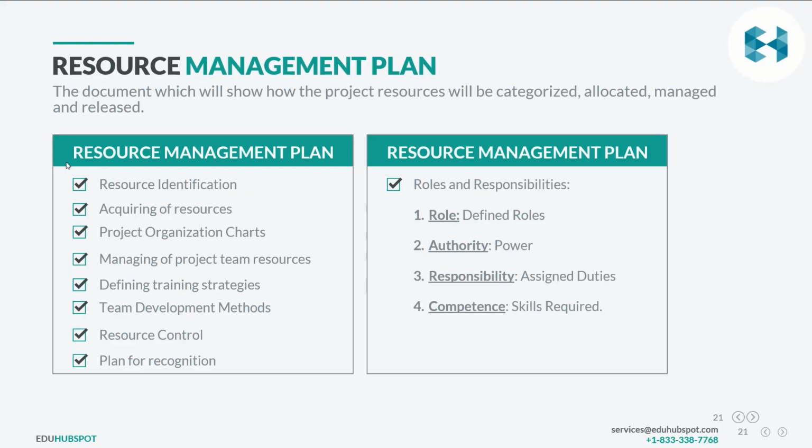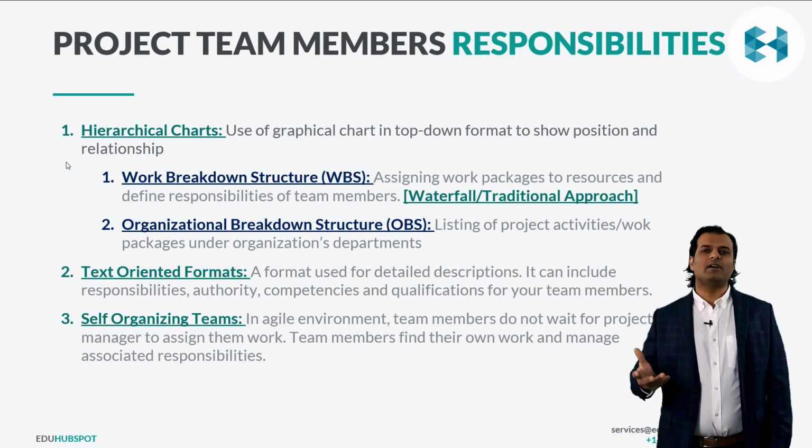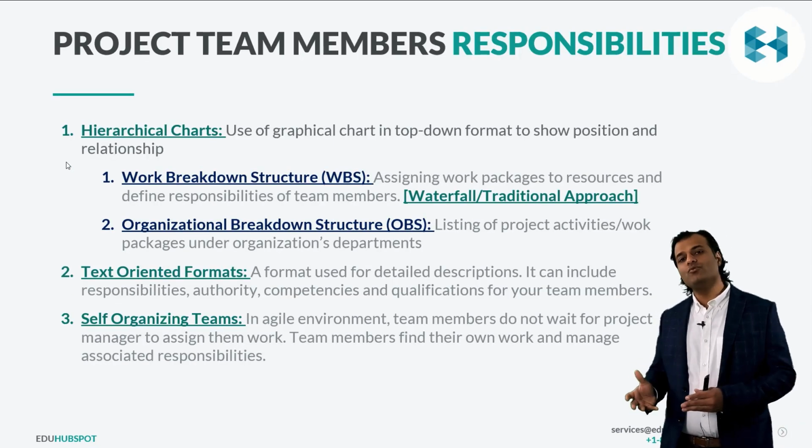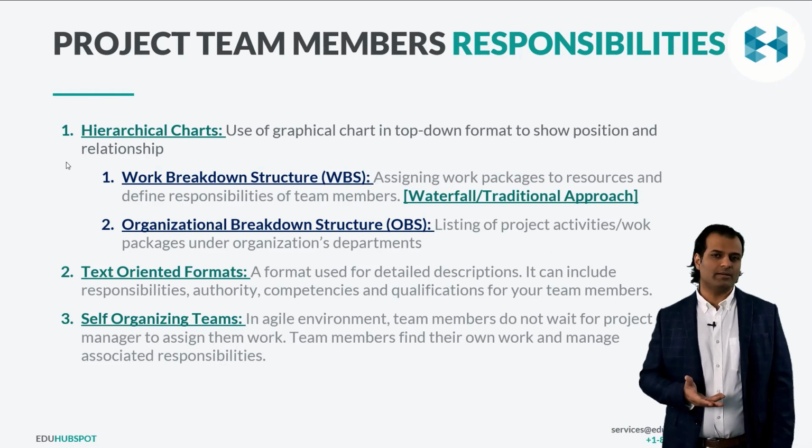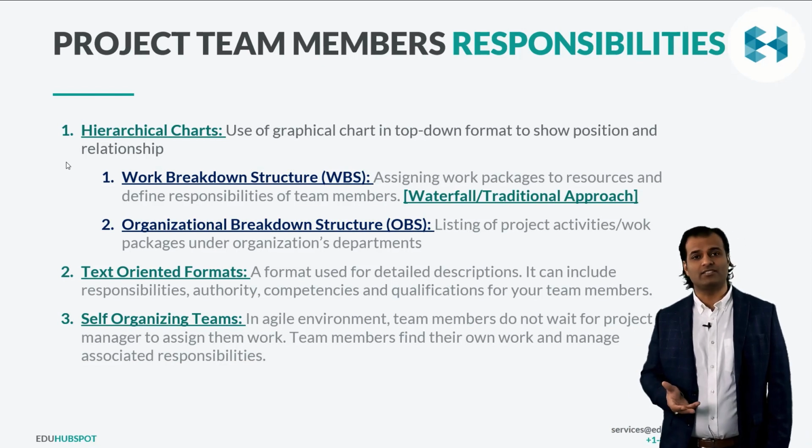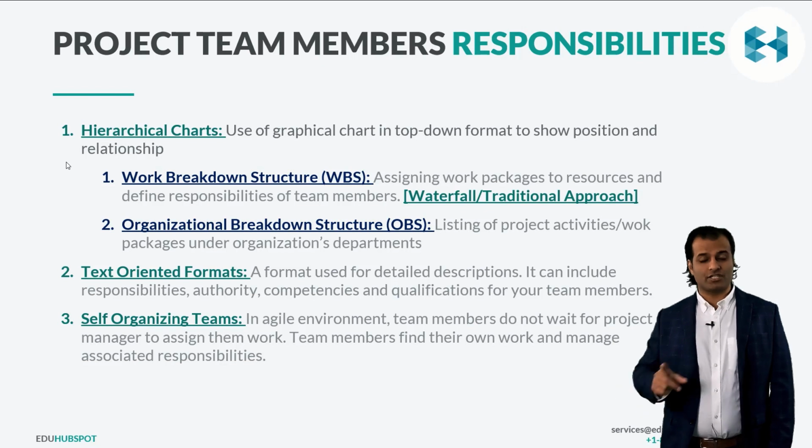So all that is part of your resource management plan related to resources, like identification, acquiring, controlling, recognition, all those things, your roles, their authority level, their competencies, responsibilities, what they will be doing, all that is part of your resource management plan. And then, we use different techniques to come up with these plans. We use hierarchical charts, we use your work breakdown structure, something which I will explain in the next section.